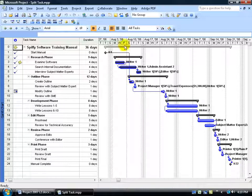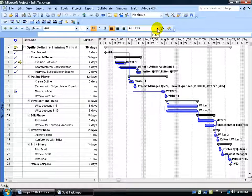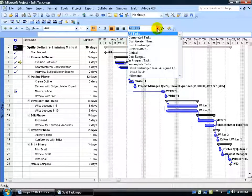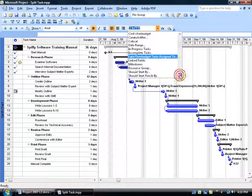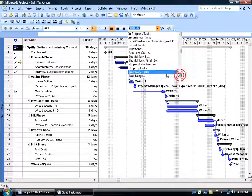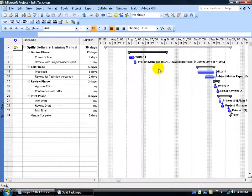To do that, just come up here on the Formatting toolbar, click on the drop-down arrow. You can see when I hover over it, the little pop-up says Filter. By default, it's displaying all the tasks. When I click on the drop-down arrow, I want to come down here and scroll down to Slipping Tasks. Select it.